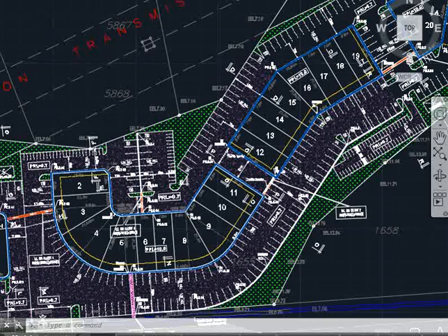For building units, we will require a structural plan. The engineer shall design the building structures in accordance with the architectural plans produced by the architect. The design calculations for the structural plan, as well as the detailings, are later to be submitted to the local authorities as a record. In case there is a need to review those designs and drawings, those records are traceable from the local authorities. Similar goes to the engineering plan, providing the details of the road, drains, as well as the site layout.